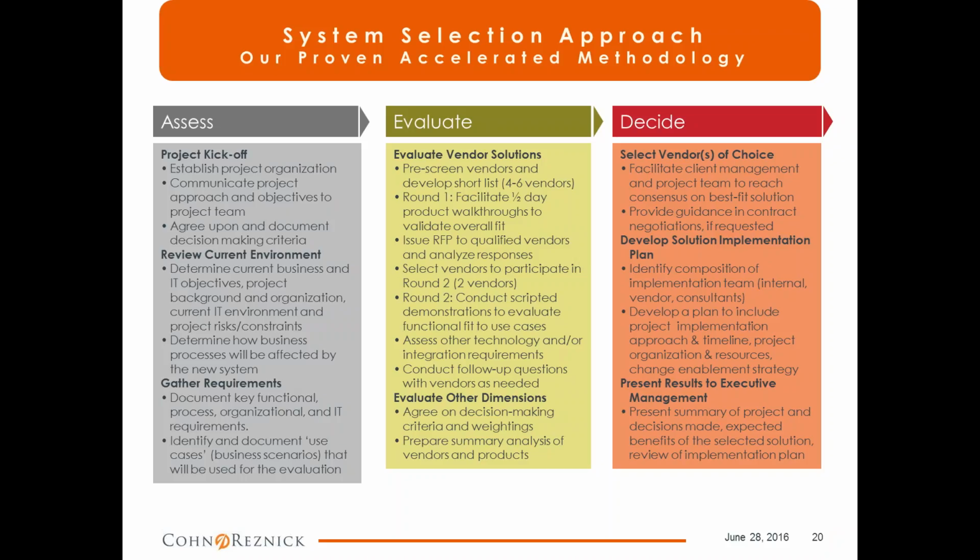The first step in the process is the assessment process, and the real key step there is building a project team. There are really two major compositions of a project team. There's the executive sponsor or sponsors, and they need to support the process going forward. We're going to be initiating business change as part of this process, and we want an executive sponsor that can reach out to anyone in resistance to change and help us push through that resistance, or handle any decisions that come up that have to be made very quickly. So it needs to be someone who's influential, well-respected, and that will support the project from beginning to end, monetarily and with his push in the company.